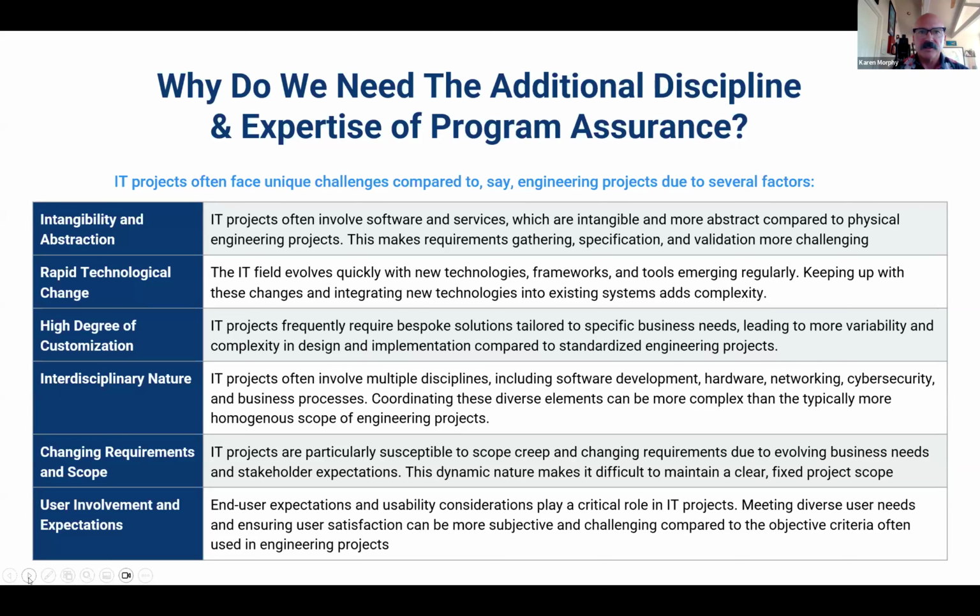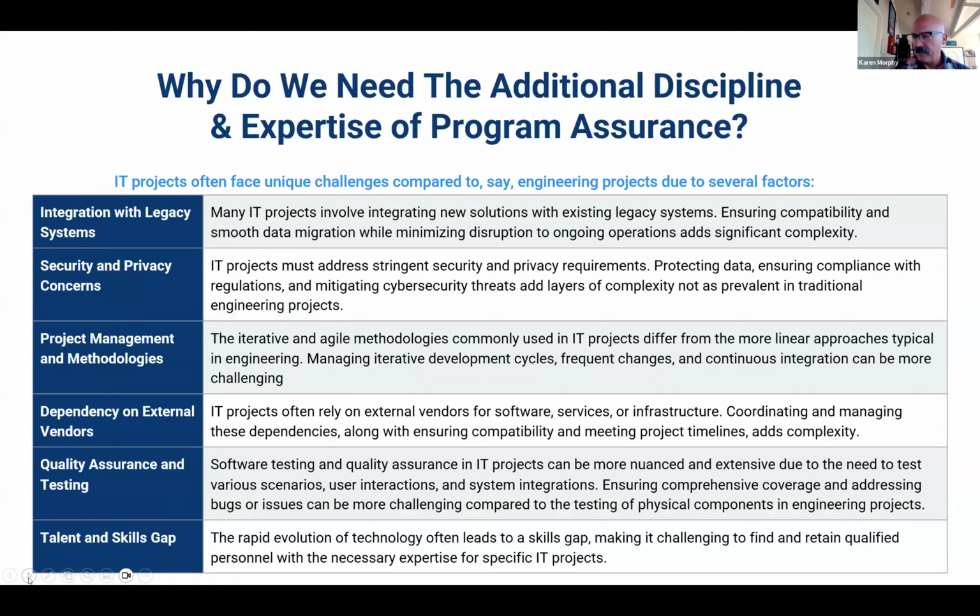So this requires a lot of planning and coordination, ensuring these different skills are available to the project at the right time, and that they're able to coordinate and talk. If any of these essential experts are not available or are delayed, it can impact the timeline. So you can see how quickly that can become a complexity that impacts the project.